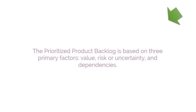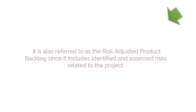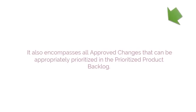The Prioritized Product Backlog is based on three primary factors: value, risk or uncertainty, and dependencies. It is also referred to as the Risk Adjusted Product Backlog, since it includes identified and assessed risks related to the project. It also encompasses all approved changes that can be appropriately prioritized in the Prioritized Product Backlog.